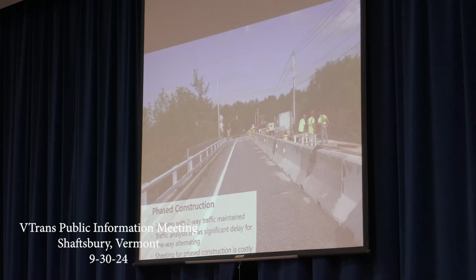Supportive excavation sheeting would be required between each of the phases, which is very costly, as well as the increased duration with the phase construction is a detriment to phase construction.